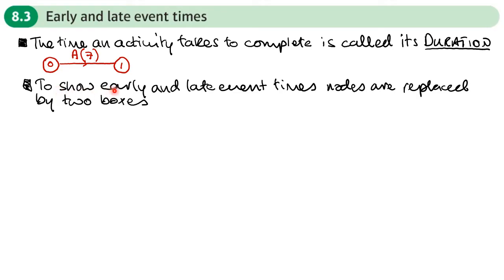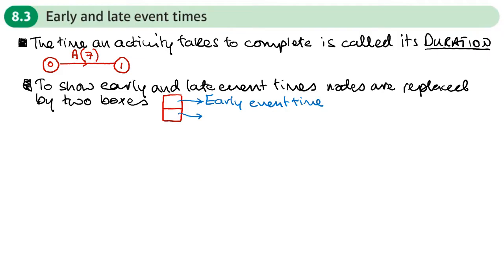To show these early and late event times, nodes in the activity network are replaced by two boxes. What you'll see on an activity network are two stacked boxes. The top box will contain a number we call the early event time, and the bottom box will contain a number we call the late event time.